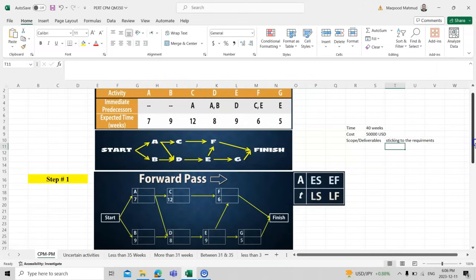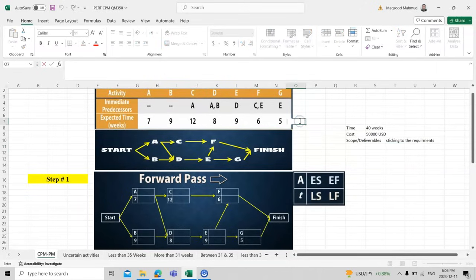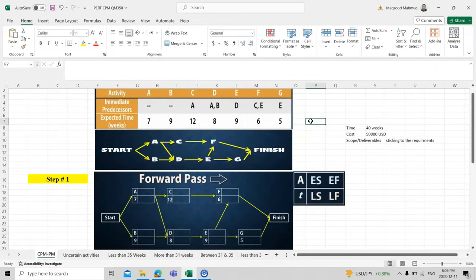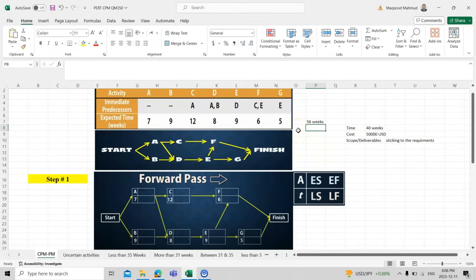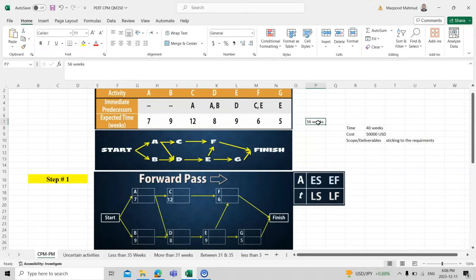If we calculate all weeks sequentially, the total would be approximately 56 weeks. But since some tasks are parallel — like C and D are parallel, and F and E are parallel — the weeks would be reduced to maybe 30 plus or minus. Let's see how things go further.